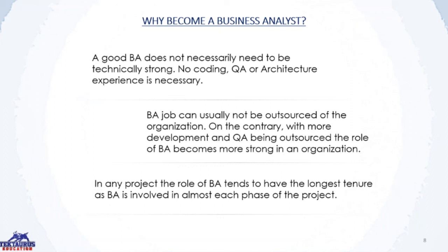So in the change control process, in the change control board, where you're doing integration with many different systems and components, a business analyst role is crucial because you would know the interconnectivity points and the impact of the change, upstream, downstream, trickle-down impact of that change. It is not just about changing a line of code. If a formula is changing, what else could get impacted?